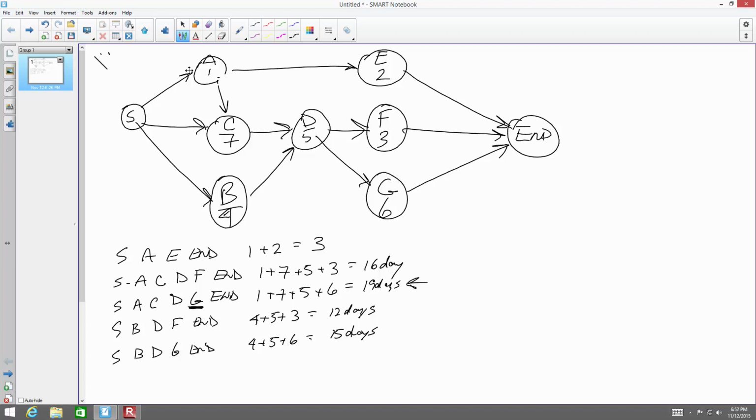So in a value engineering situation, the designer or contractor is coming up with an alternative solution that's better. It produces the same final product, but through a different methodology, through a different design scenario, but produces the final end result. You see that a lot, real common. It encourages people to be tremendously creative.